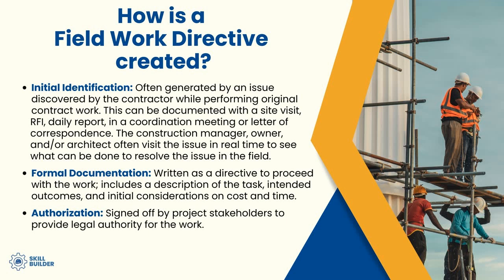So how is a field work directive created? Well, we're going to identify initial identification, then we're going to provide formal documentation, and then we need authorization. So the initial understanding of what it is that we're dealing with is what is going to generate that field work directive. It's usually a superintendent coming to your trailer and pulling you out and saying, look, you got to